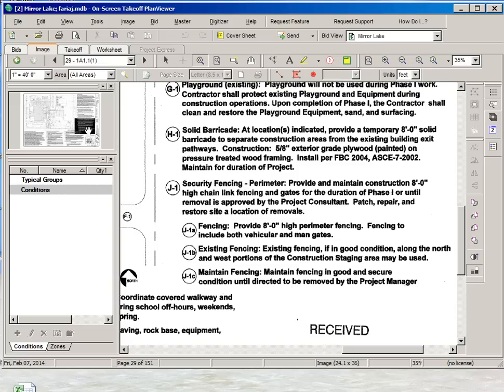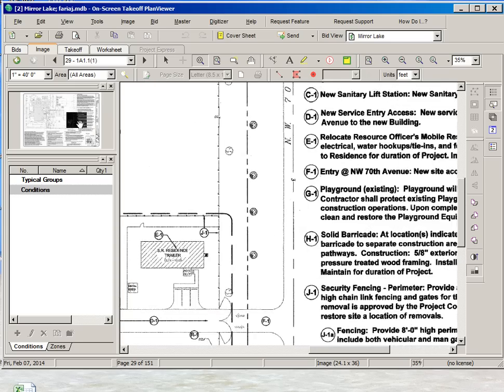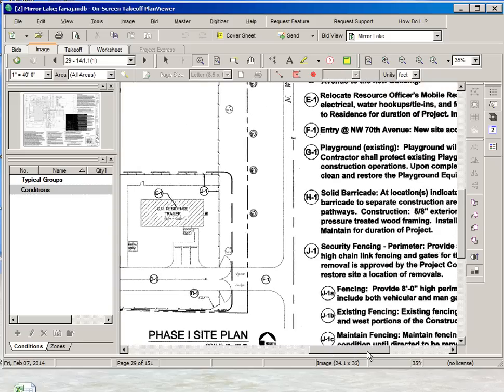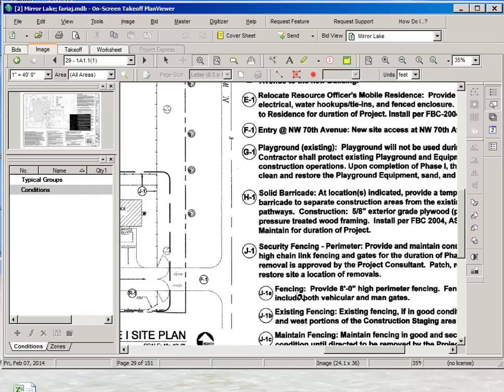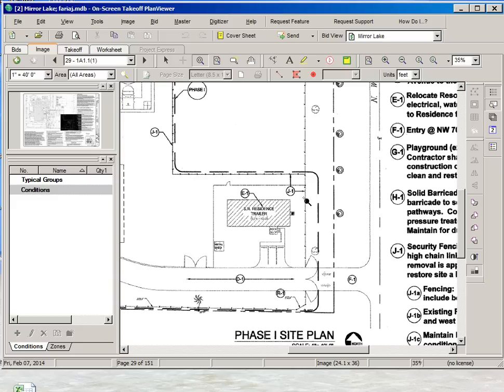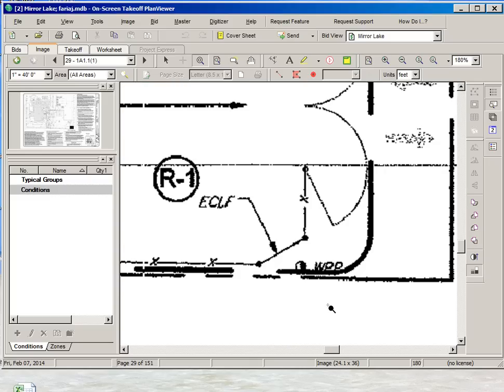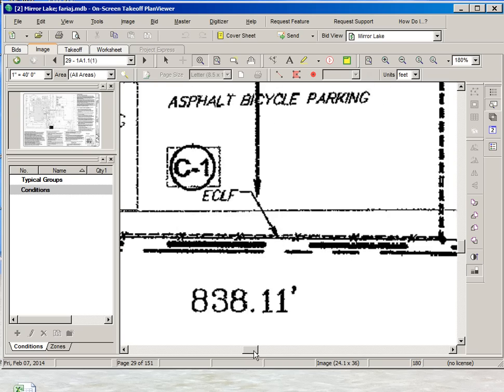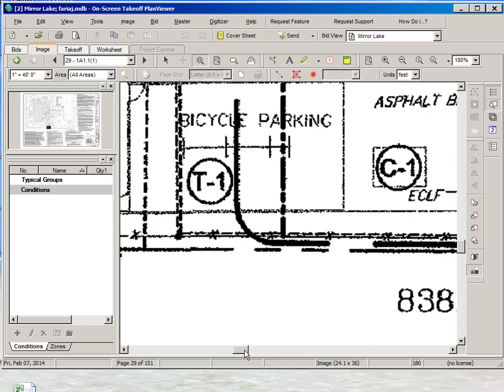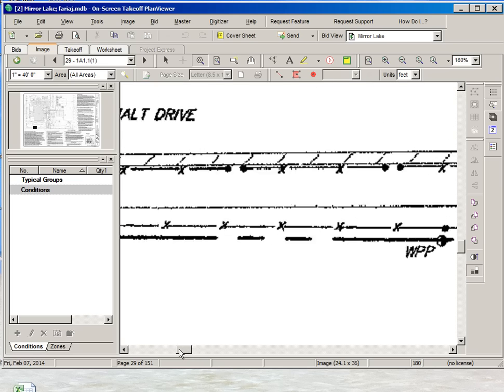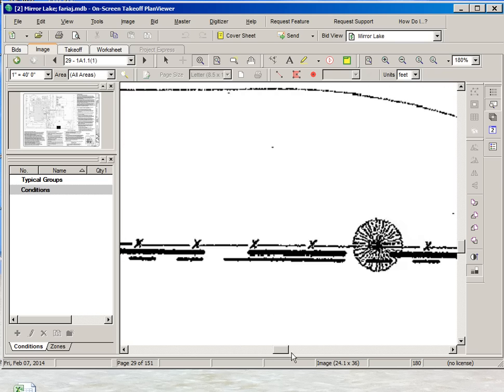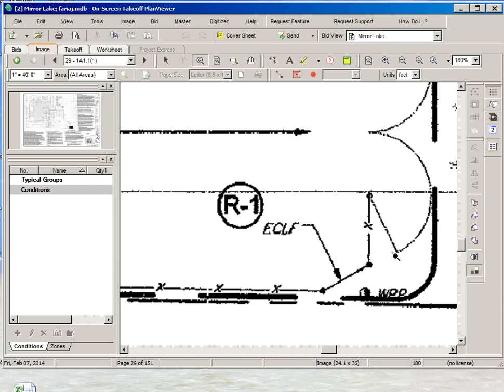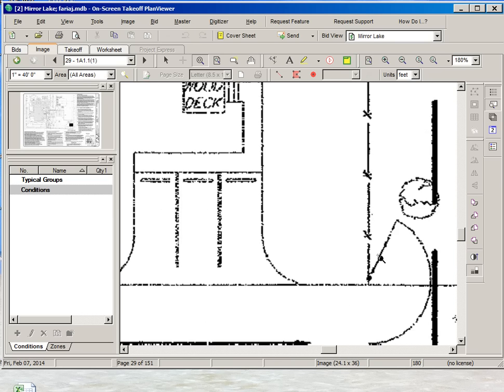We need to start by locating the scope of work in the course drawing. So we see that on this lower corner we have J1 which is the fencing, the security fencing. So this section here seems to be part of the new fence that needs to be installed. If we look closely we will see this symbol ECLF which stands for Existing Chain Link Fence. So we can assume that this fence on the bottom side of the drawing is an existing fence. And our scope of work will be starting down here with the new fence.